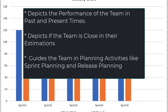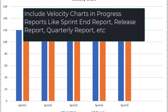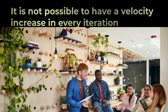Similarly, in release planning, teams divide the size of the release by their average velocity to calculate how many iterations will be required to complete the release work. Therefore, do add velocity charts to your project reports — whether sprint-end reports, quarterly reports, or any other. By looking at velocity charts, teams can govern whether they have been estimating correctly and whether they are improving over time — gradually increasing their velocity. However, expecting a velocity increase after every single iteration is neither possible nor productive for the team.